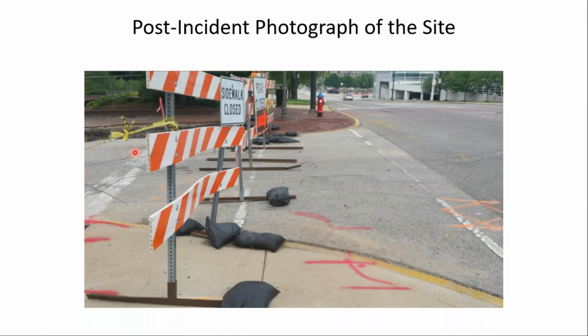The traffic control device subcontractor placed the type 3 barricades, or his crew placed them, and he said the crew placed them back behind the stop line because he had been to training and he knew that the feet of type 3 barricades, this was his testimony, could be a tripping hazard.